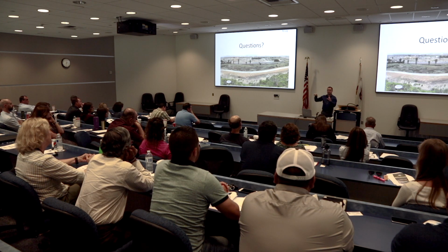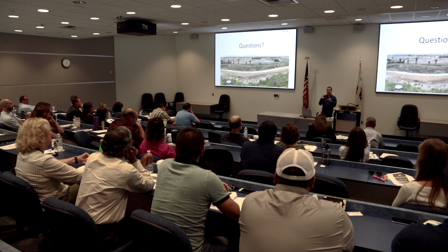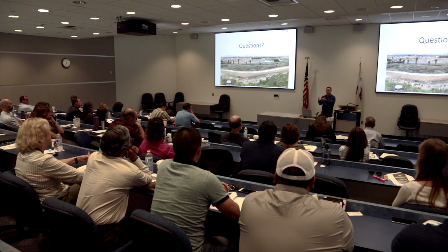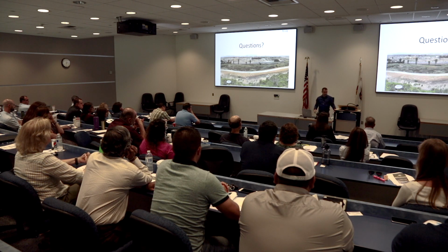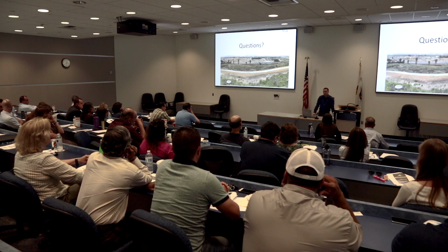But all of their perimeter controls aren't really doing anything for the inlet control that's going direct from that location. So they almost have to have an interim SWPPP that does smaller areas within there if they're going to do phasing, and that's something that was not done.